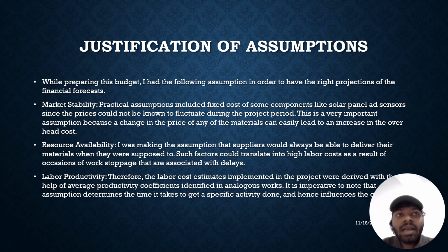The labor cost estimates implemented in the project were derived with the help of average productivity coefficients identified in analogous works. It is imperative to note that this assumption determines the time it takes to get a specific activity done, and hence influences the cost. This is the justification of assumptions in my project.